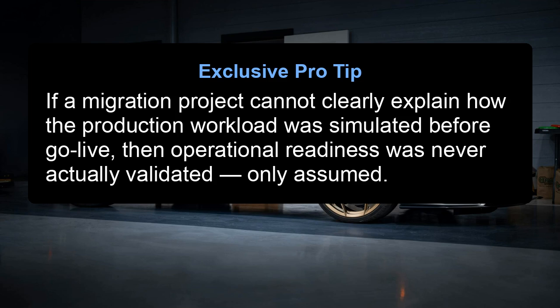Exclusive pro tip. If a migration project cannot clearly explain how the production workload was simulated before go-live, then operational readiness was never actually validated, only assumed.